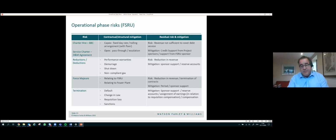If, as a result of force majeure, the performance of the FSRU sponsor or the use of the FSRU by the project is interrupted, the project will often have the right to terminate the charter if the event in question affects the FSRU's performance or the project's use of the FSRU for a defined period of time, for example, say 12 months. However, if the project's right to terminate arises from an event of force majeure that affects the power plant and related facilities as compared to the FSRU, then it is likely that the FSRU sponsor will require the project to pay a force majeure termination fee for termination of the charter for reasons that fall outside of the FSRU sponsor's control.